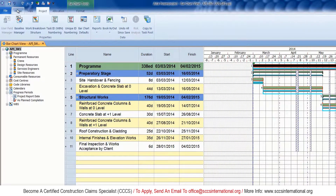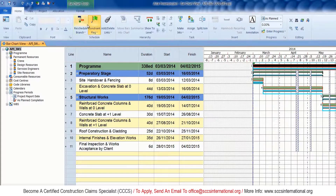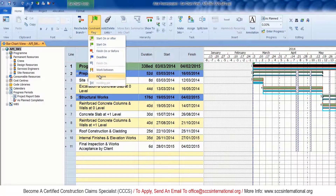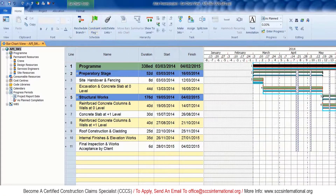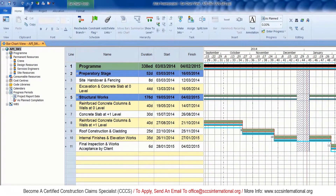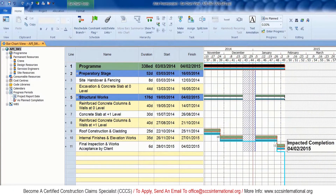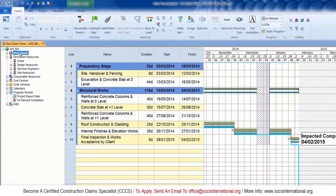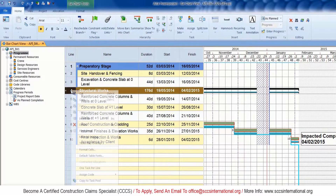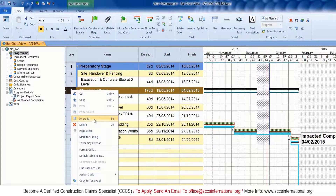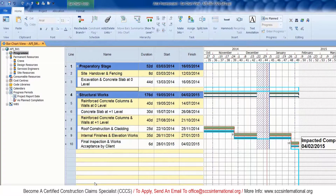An important thing to remember before doing an impact analysis is to ensure that all constraints are removed. As you can see here, there is a constraint in this activity and I'm removing it. In general, we will be inserting a delay event depending on which activity it affects.